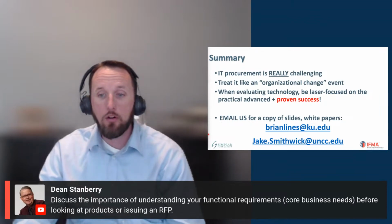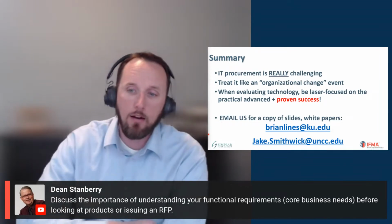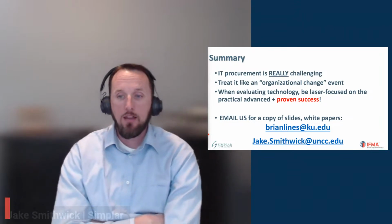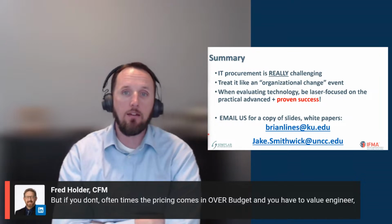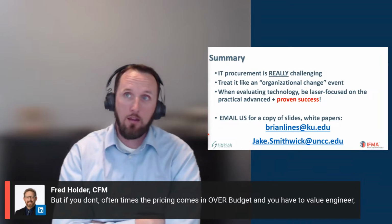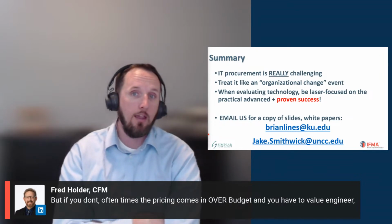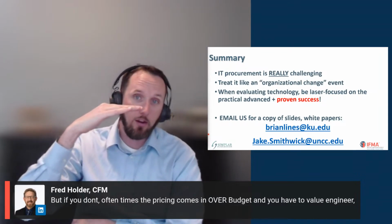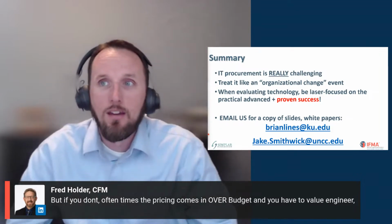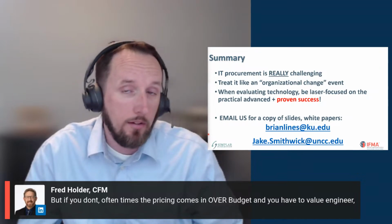We had another comment earlier from Fred Holder talking about the budget. I saw that comment come over about not providing that budget number. I have seen that. So Fred's comment here is if you don't provide the budget, then many times the proposals can come in over budget. And I tell you what, folks, that is a really, really difficult situation to be in, right? If you have a budget threshold and you don't tell anybody about this, all the proposals coming in, now we've got an uncomfortable conversation at best. And at worst, the project's canceled, right?